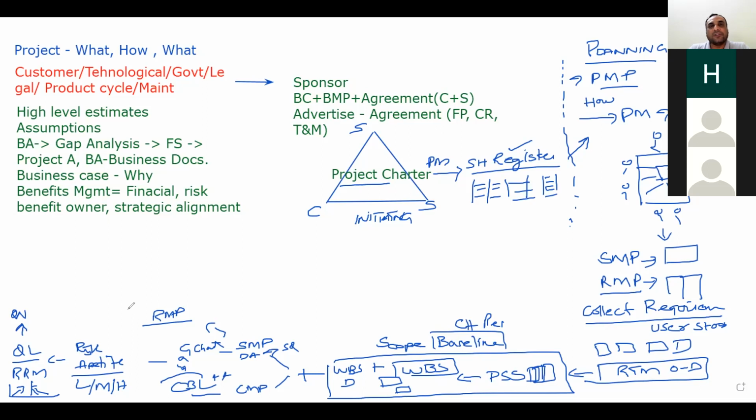Similarly, for risk management, we can prepare the risk response. We can accept the risk, and acceptance is of 2 types, passive or active. In active acceptance, we allocate the contingency reserve, which means we are acknowledging the risk.